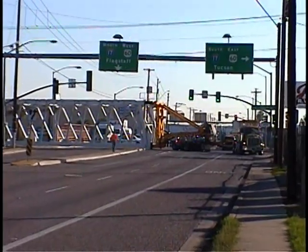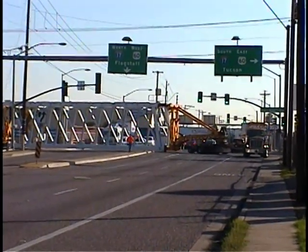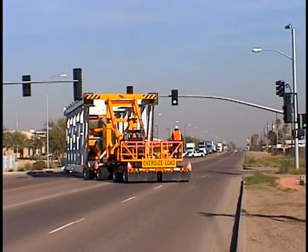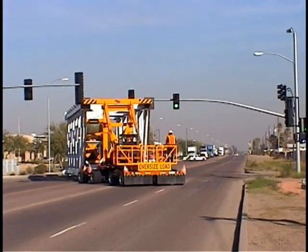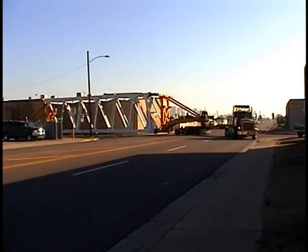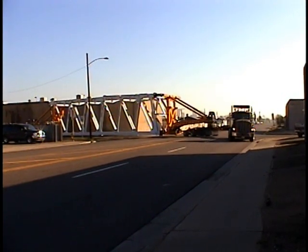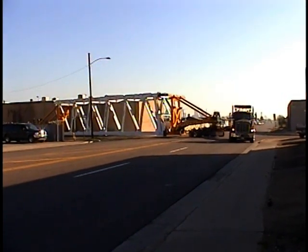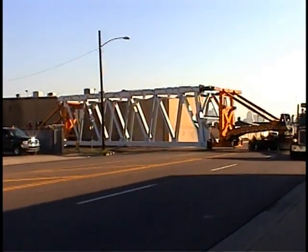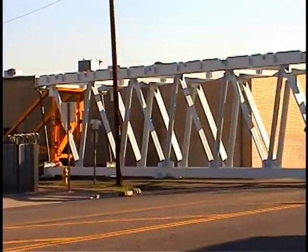The 15-mile haul route from the fabrication shop to the stadium consisted of crossing several bridges and wrong-weighing city streets to avoid light signals. The combined weight of the truss sections and the transport equipment exceeded the Arizona overweight permit limits for the number of axles and axle spacing being used. The law does provide for additional loading for dolly widths from 14 feet to 20 feet out to out, as much as 100% additional load for 7-foot wide axles 20 feet out to out.